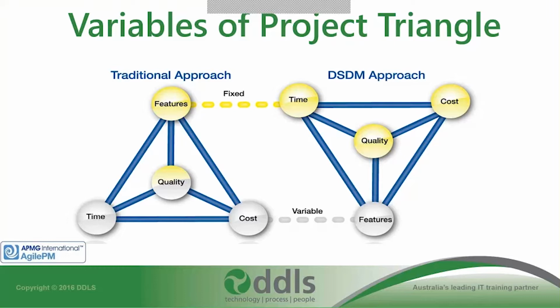What happens is that your scope becomes your variable item. And here in most Agiles, you always have a list of prioritized items, things to do, and we do that in priority order. What are the most important things for my house? For it to be a house, it needs to have my 4 walls, the base, the roof, and a few bedrooms, kitchen, bathroom. Then we have this priority list, and we keep going down it, all the way down to my garage, down to walk-in wardrobes, down to my garden. My garden, to me, is not a necessity, but that's to me personally.